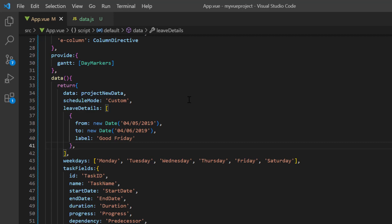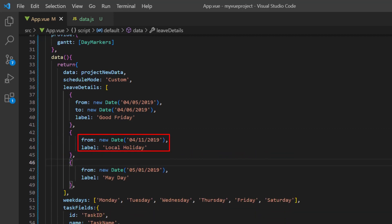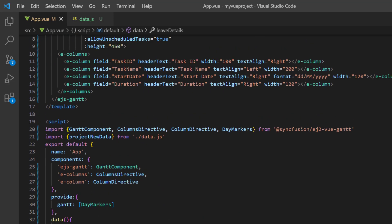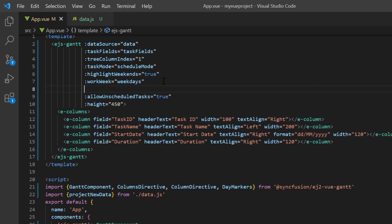Then I define another holiday from April 11th, 2019 and label it as a local holiday. And define May 1st, 2019 as May Day. Finally, I assign leaveDetails to the holidays property.